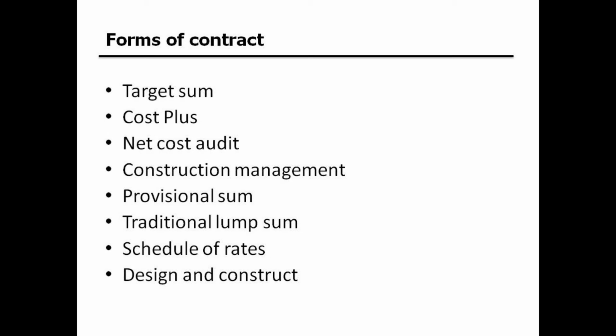Schedule of rates is usually adopted when you're really unsure of the full project scope. The work's carried out at pre-agreed rates. In my experience, I've used it in hospital refurbishments and also in civil works where you've got so many kilometres, but you're unsure of what that's going to be in road and different forms of piping, that type of thing. Also used in maintenance contracts and is ideal for variations and unknown time.